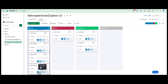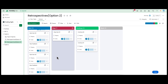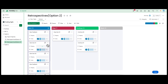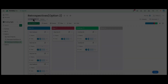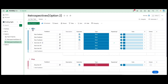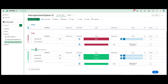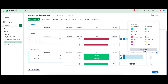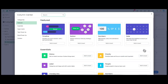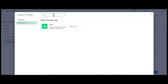At the end of every sprint, the team comes back and refines this list and their action plan. To create this board, under the Main Table tab, you have to create a group for Start, one for Stop, and one for Continue. Then add the type of columns I have here by clicking the Add Column button. If you want more types of columns than the ones listed, click More Columns. For example, we can search for the Vote column and add it by clicking Add to Board.